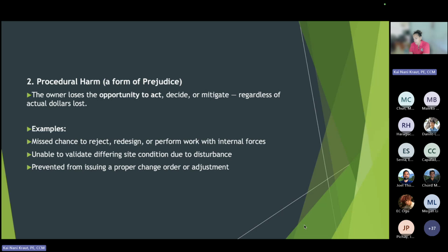Going back to the last presentation, that's why I do like to use unilaterals, because the contractor has a mechanism to be paid if they haven't given us a proposal. And at that point, it puts the burden of proof on them because they have to claim and they have to show actual records.